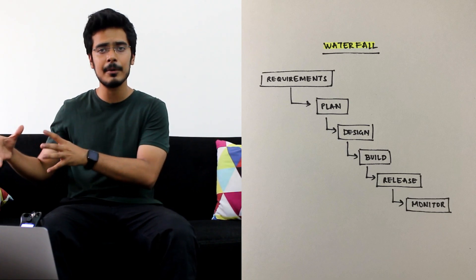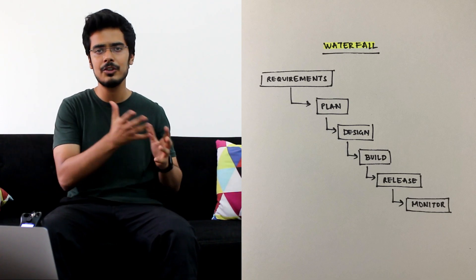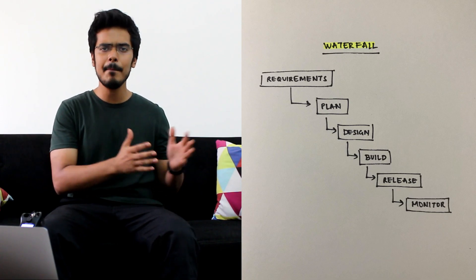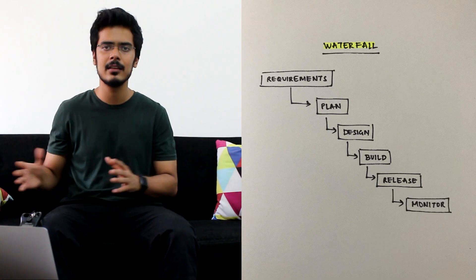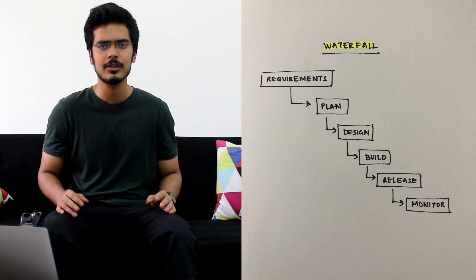You cannot have your phone developed and then go back and say no I want to change the requirement. So it's very important to finish all of these steps one after the other in this kind of a process.